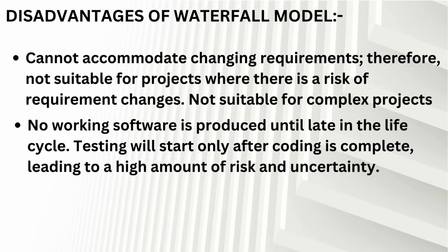The next disadvantage is that no working software is produced until late during the life cycle. This means, as I mentioned earlier, in the waterfall model, we go step by step. Without completing one stage, we cannot move to another stage. For example, we can only do testing when the development stage is fully done. Here, we cannot develop the application part by part and do testing. We have to develop the full application before testing. Because of this, a high amount of risk and uncertainty can occur.